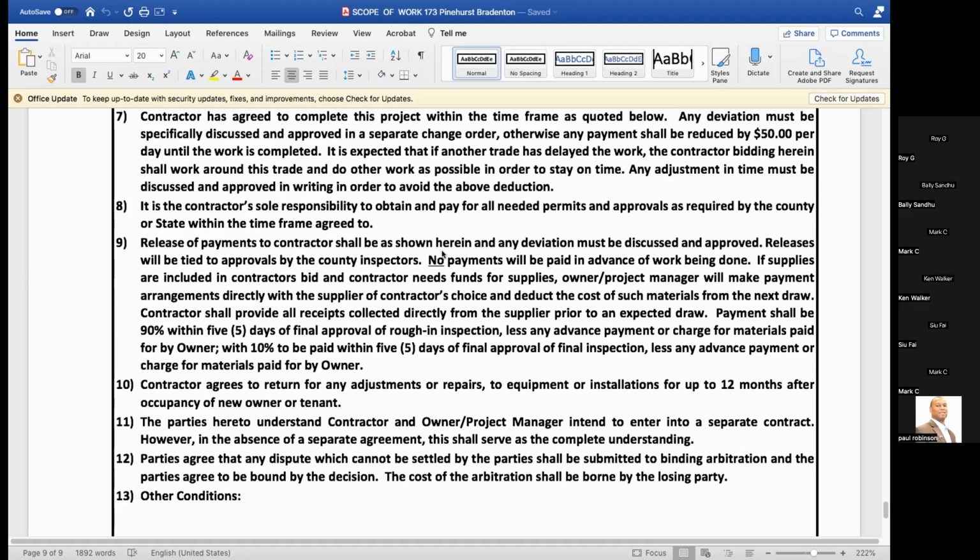When you do the incentive program, what's the incentive amount? It's pretty significant. I don't remember exactly. I have it on a sheet here, but it goes by week, and just like you, I give a grace period of what they say when they think it's going to be done, typically about 3 months or something like that. I add 2 weeks as a grace, and then anything after that, per week, the GC gets something like $1,000, and then each of the guys gets $500.